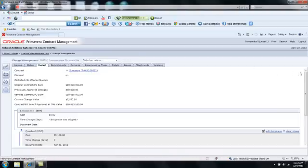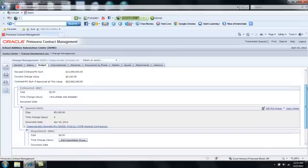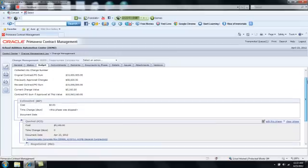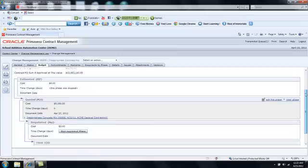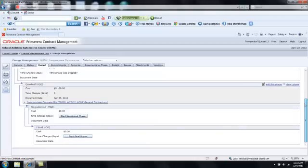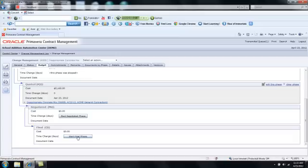And click the Budget tab. So on the Budget tab, I can see the various different workflow phases that I am using to progress my change through the owner. If the owner comes back to me and says that's too much money, I think you can get this done for $5,000, I might then be able to start the negotiated phase. If that's acceptable to the owner, then I can advance directly to the starting of the final phase. And that's what I'm going to do. I'll click Start the final phase.